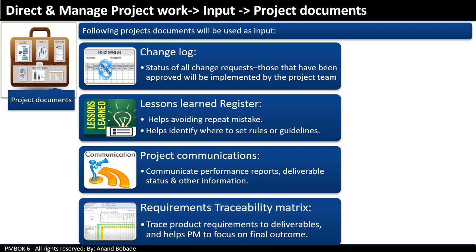Requirement traceability matrix. During this process, the team is working on deliverables. If there are any issues with their completion, the requirement traceability matrix will help in tracing the underlying requirements connected to those deliverables.